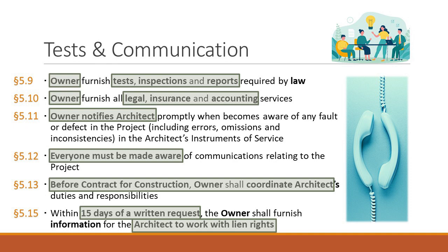Well, the electrical engineer can always sue the architect because presumably they have a contract together. But the architect may not want to pay, or maybe says you did it wrong, or what have you. And in the meantime, the owner is enjoying the benefits of that electrical engineering services because the house is finished, or it's being built, and it's going to have this really nice electrical system. And so the lien allows the electrical engineer to place a lien on the property and to sue the owner for its $10,000 worth of services.